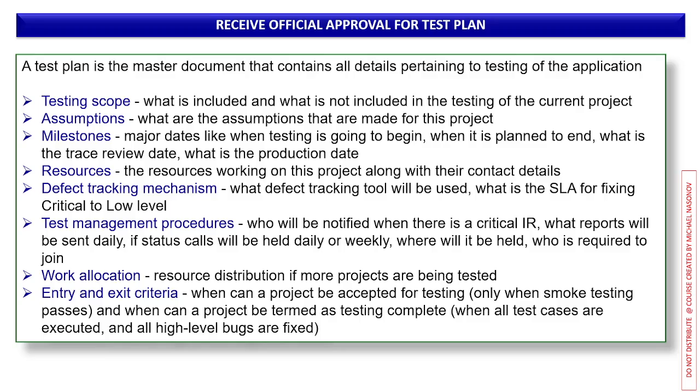And finally, entry and exit criteria. When can a project be accepted for testing? For example, only when smoke testing passes. And when can a project's testing be considered complete? When all test cases are executed and all, let's say, important defects found are fixed.